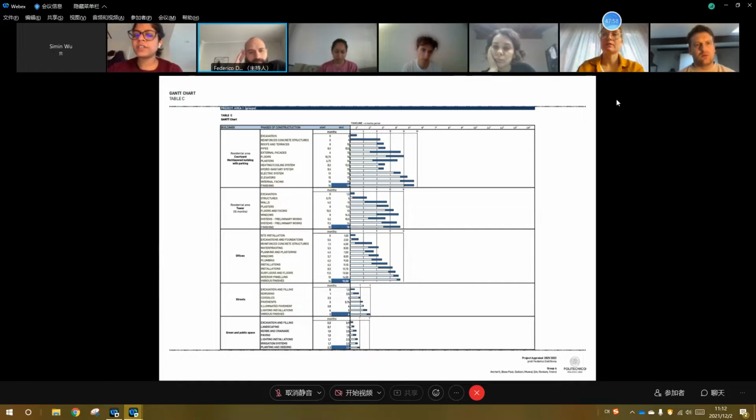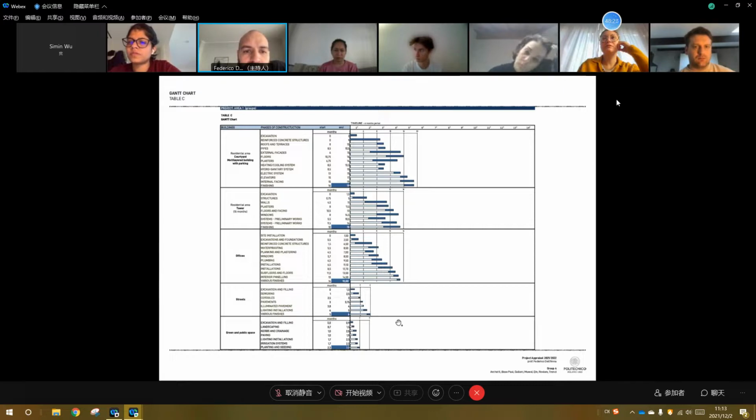We did the residential typology in 2 different ways, the courtyard and the tower. They have 2 different timings. The courtyard buildings take 19 and the other one takes 15. So maybe you can move the works for the construction of the office from the period number 3. So, not start all operations at the same time.